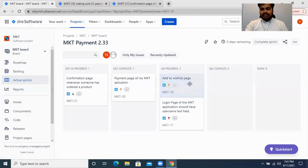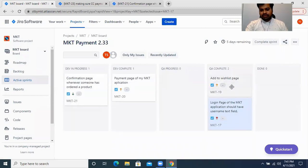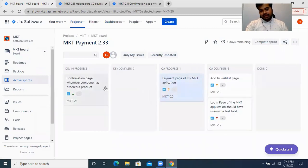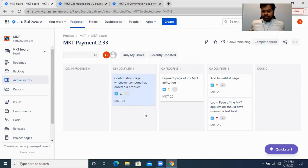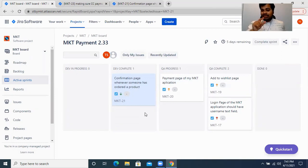As a tester, you should continue working on those QA In Progress tasks based on priority. The developer will continue working on their task since they were already working on it before the previous sprint ended. Once tasks are completed you can move them along the board. This visibility makes it easy for your Scrum Master, Product Manager, or any manager to track what developers and testers are working on, which task they're on, and the status of each task on a daily basis — that's the reason we follow sprints. Your sprint can be seven days, two weeks, three weeks, one month, or even custom.